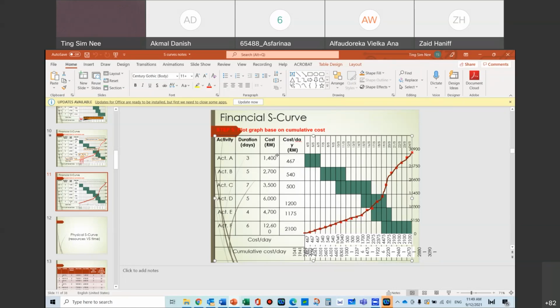So you need to know, originally, as the supplier or as the builder of the facilities or as a contractor, I'm going to spend this amount on activity A. I'm going to spend this amount on activity B. I'm going to spend this amount on activity C. And then I list it down. Then at the end of the month, I will check with my account side. We have a meeting, sit down, show me the expenses list.